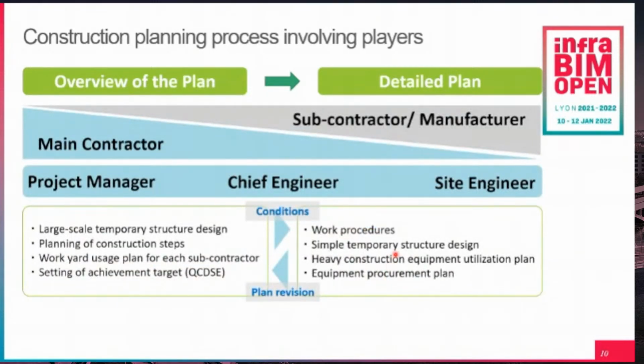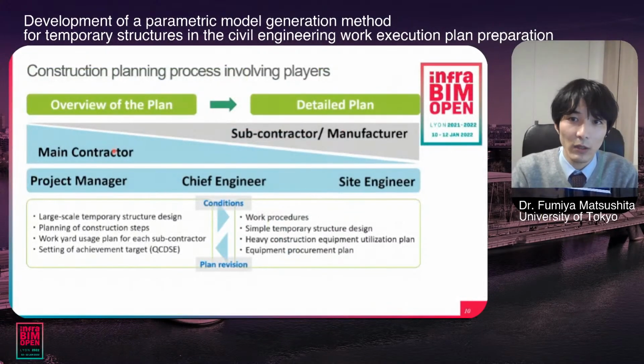From the perspective of the player who considers these contents, the main contractor is mainly in charge of the overview of the plan, and subcontractor and manufacturer are mainly in charge of the detailed plan. Even within the main contractor, the overview of the plan is handled by managers such as